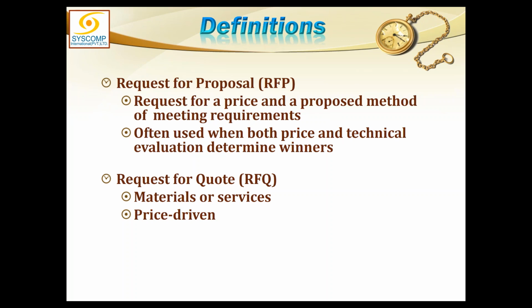I don't know how to get the room cooled to that level and humidity maintained. So if I ask for a solution, I don't know what kind of machine would be installed. This is the request for proposal. Somebody would quote an AC, somebody would quote some other solution. All are welcome, and whichever is the best solution should be selected.